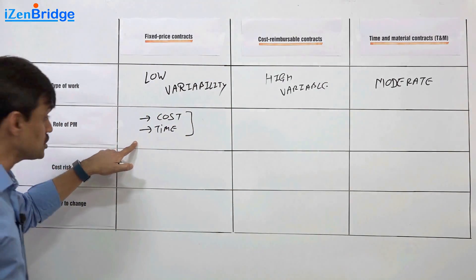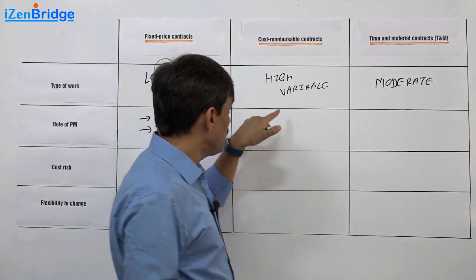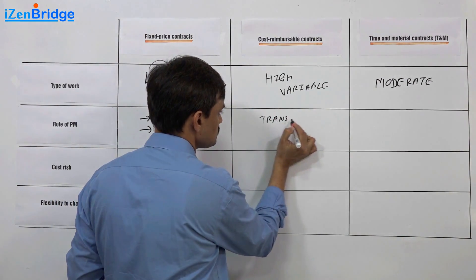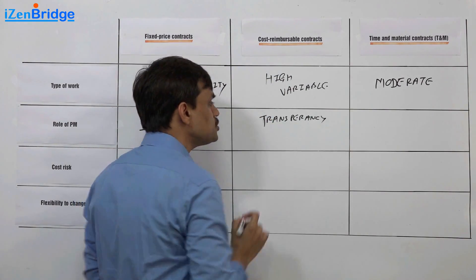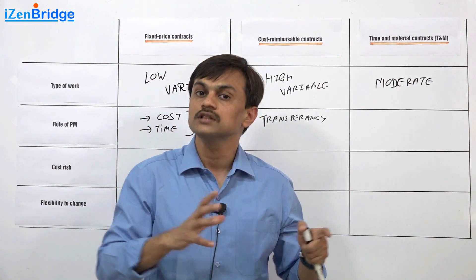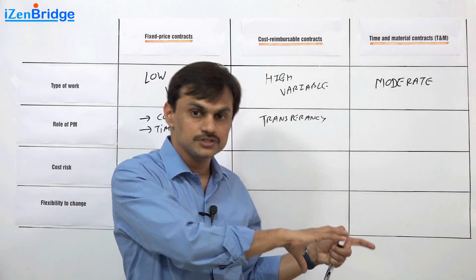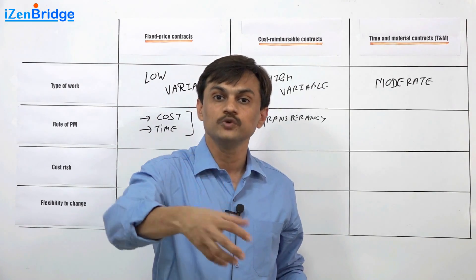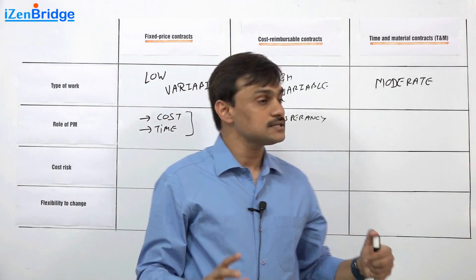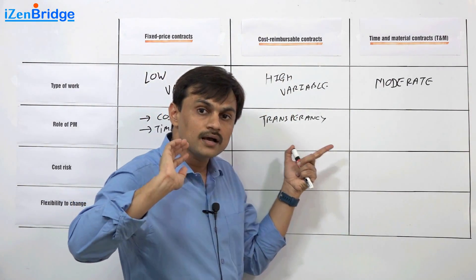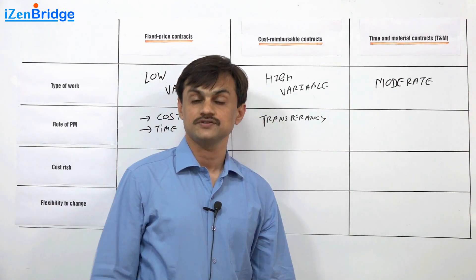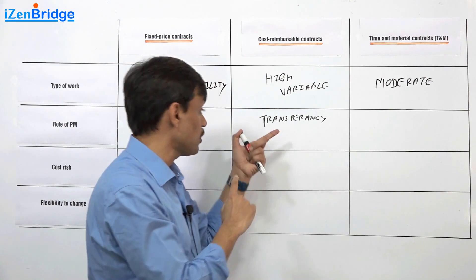In a cost reimbursable case, if you are a project manager, your focus becomes more on transparency. You need to ensure that you keep record of what you are buying, why you are buying. You need to ensure that you have a proper history of all the approvals you take from sponsors or customers for that work, so that it doesn't happen that without approval you end up buying something and the buyer says he is not going to reimburse the cost. The focus for a project manager is just keep the customer, keep the buyer informed about everything. Buyer should be making all the decisions related to purchases and your project manager should have all the signatures.